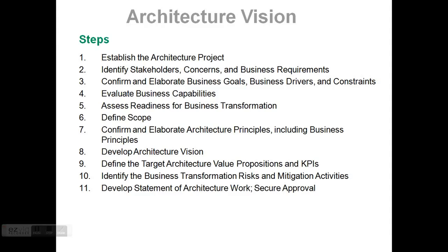Step 6 is to define the scope. Is to define what is inside and what is outside the scope of the baseline architecture and target architecture efforts. It is to create an understanding that the baseline and target need not be described at the same level of details.